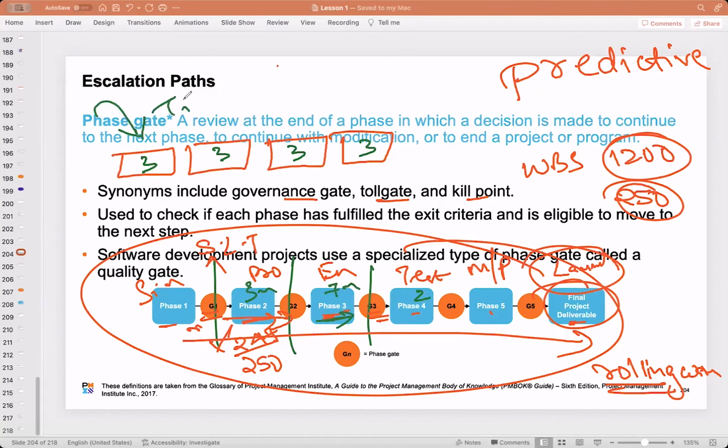We call it time boxing in agile. Please note it down. Time boxing. Here the duration is getting fixed. Whatever the team is able to do in 3 weeks, they will commit and agree, and then they will finish. Whatever they can do in the next 3 weeks, based on prioritization, they will commit and finish. That is what it is.